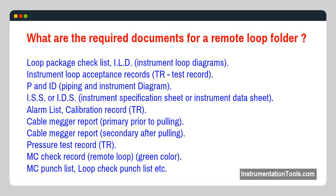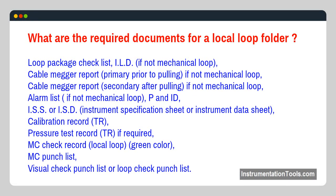What are the required documents for a local loop folder? Loop package checklist, ILD if not mechanical loop, cable mega report — primary (prior to pulling) if not mechanical loop — cable mega report — secondary (after pulling) if not mechanical loop — alarm list if not mechanical loop, P&ID, ISS or ISD (instrument specification sheet or instrument data sheet), calibration record TR, pressure test record TR if required, MC check record (local loop, green color), MC punch list, visual check punch list or loop check punch list.